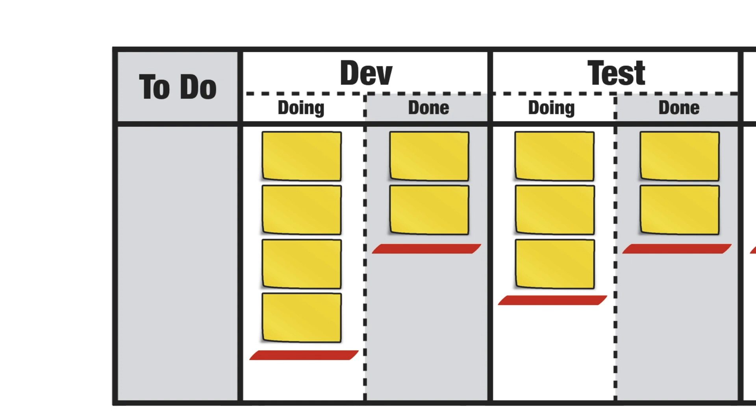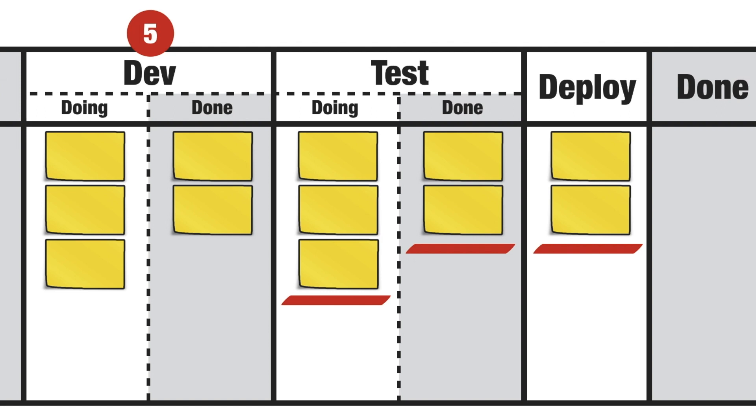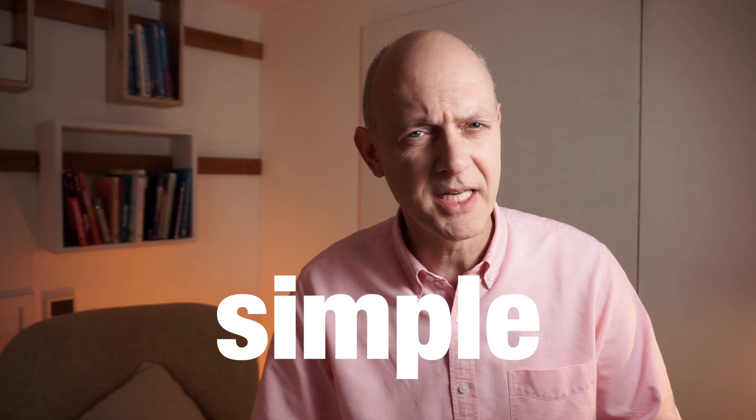Before we move on, I'm going to make a small optimization. As both of these columns belong to the development team, instead of having separate WIP limits of four and two, I'm going to impose a shared WIP limit of five. I can't use the red lines anymore, so I'm going to replace them with a number at the top. Similarly for test, in place of limits of three and two, I'm going to impose a shared WIP limit of four. As you'll notice, I've just reduced the work in progress of the system as a whole by two, and that should be good news. All things being equal, items will now get across the board that little bit quicker — though imposing WIP limits is one of those things that is simple but not necessarily easy.